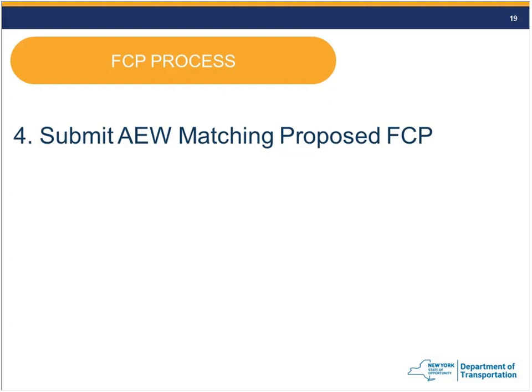When it comes to quantities regarding going over, especially major items, it has to be treated... Simply put, you cannot cross categories with the field change payment items, meaning you can't increase the quantity in category number 1 using the field change payment item in category number 2 or vice versa.